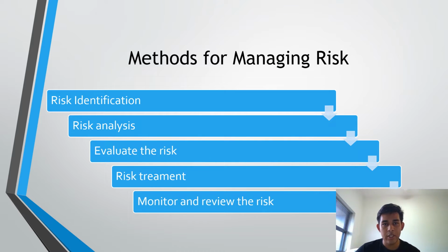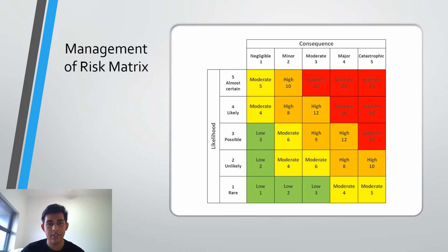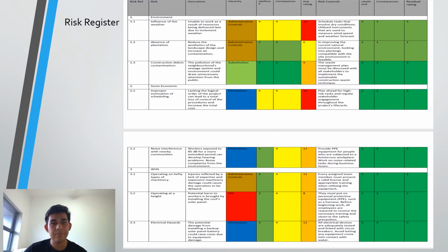If not managed properly, the risk might lead to project failure, therefore our risk management strategy must be applied. This strategy intends to detect and assess potential risks. Using a risk assessment approach, the risk matrix will be used to assign a maximum of 25 points to each risk. It compares the likelihood of incidents to the risk effect level. The higher the score, the greater the likelihood of an unfavorable outcome.